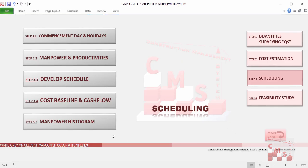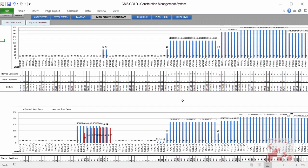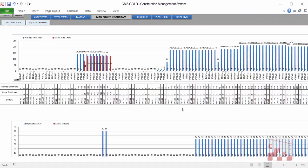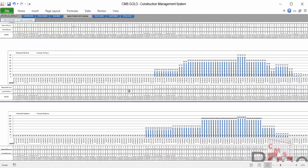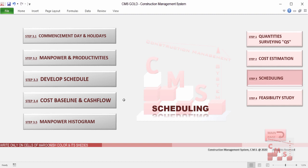Furthermore, CMS will produce the required manpower histogram, allowing you to know from the beginning of the project what civil manpower is required — carpenters, steel fixers, masons, tile fixers, plasterers — and the total civil manpower. It gives a full histogram showing the amount of manpower and the timing for deploying and releasing them, all automatically by CMS. This also allows you to know the capacity of the company required to work on this type of project.